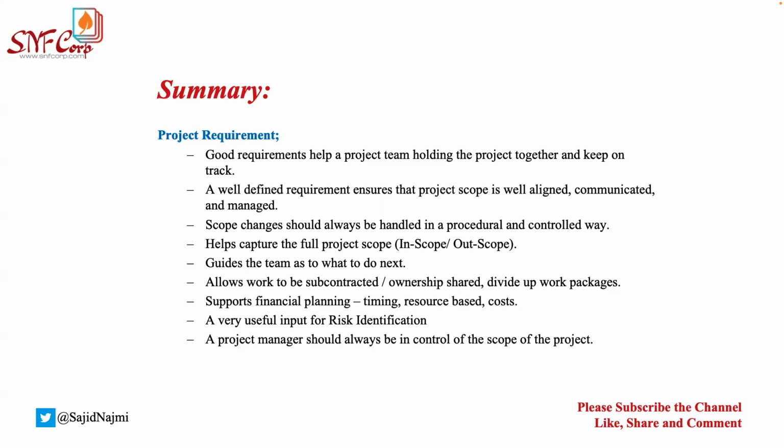Why? Probably in the future, during the testing phases, UAT phases, the business may ask you the same thing once again. The business may not recall that discussion. How will you push it back, and how will you fight with that? How will you save your team? You need to have something written. So you can go ahead and review the documentation and show them, this was already mentioned, that will not be done, that is out of the scope of this project, and we have agreed upon this. And you're safe, you're good. So sometimes it is important to write the out of scope requirements as well in your documentation.